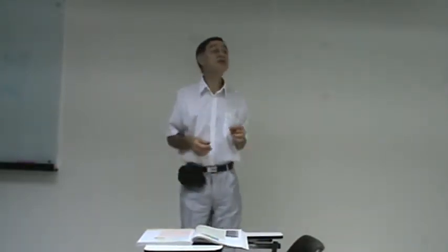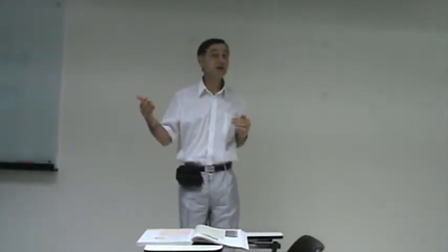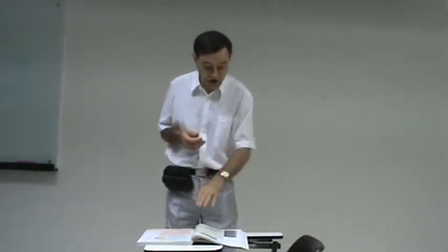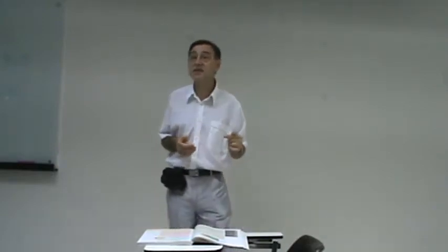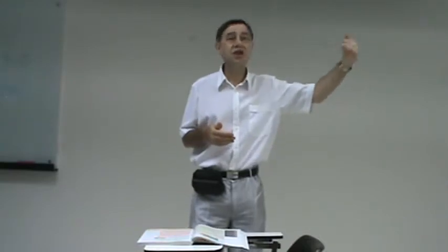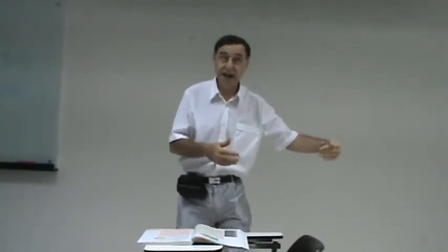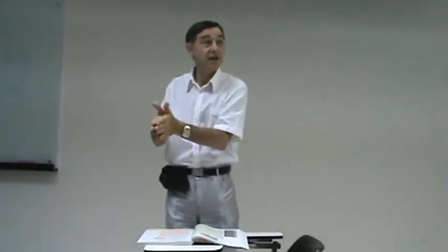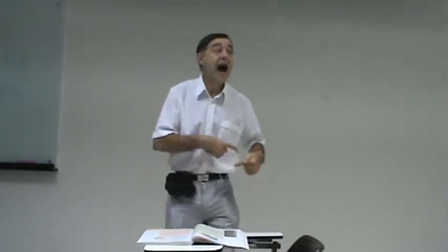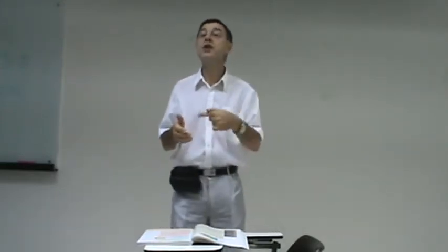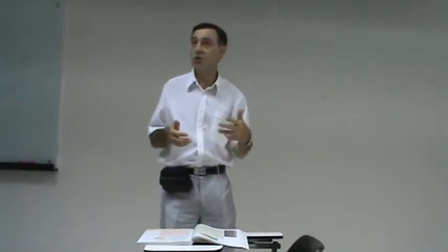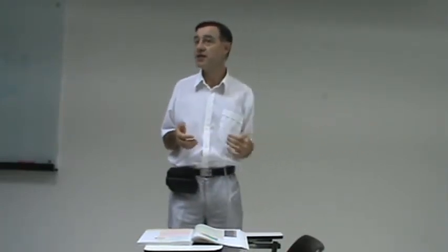And the last contingency variable is the time frame. The time frame is associated with what's called commitment. The commitment concept tells you, if we planned something 3 years ago, for example, that we're going to build a brand new hotel, and the hotel should be coming in ready now, our new plan should incorporate decisions that we made 3, 2, or 1 years ago. In other words, decisions that were made in the past.